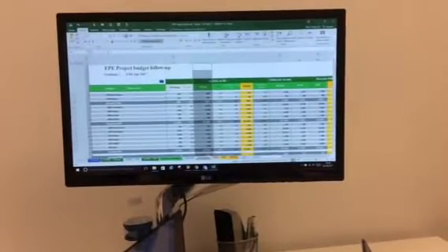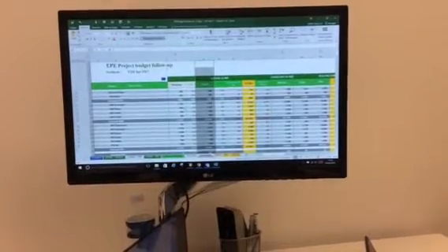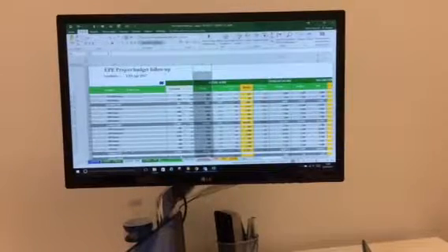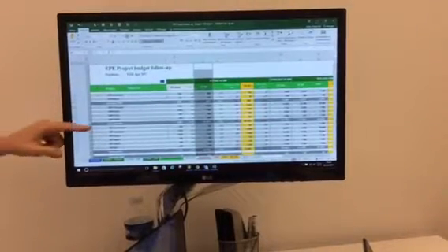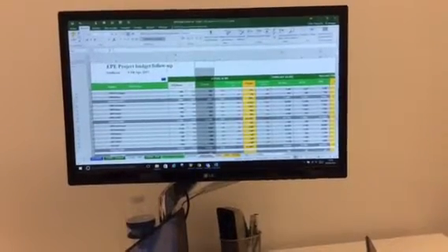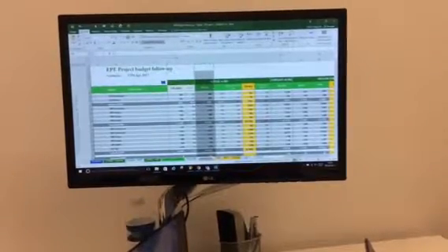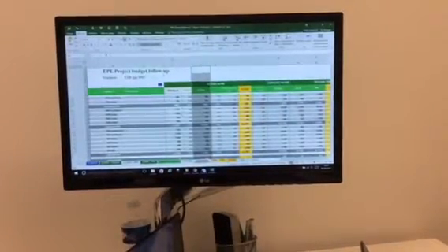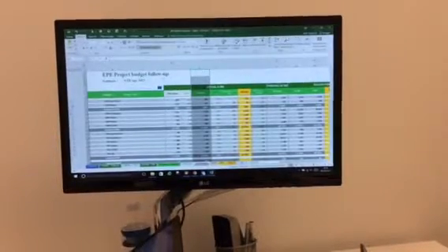So just what I wanted to add is MS, macro schedule, is the place where every project manager will request for some resources that he will need in order to make advance his project. Right. So if I'm managing, I don't know, about the EcoStructure, I will request, I need 10 people, 2 people from India, 1 person from US, and so on. And then for a month plus some cost. For the month till the end of the year.